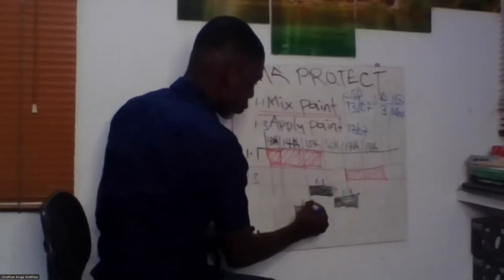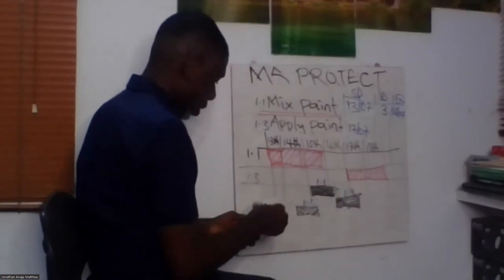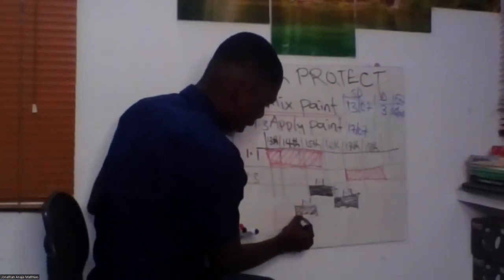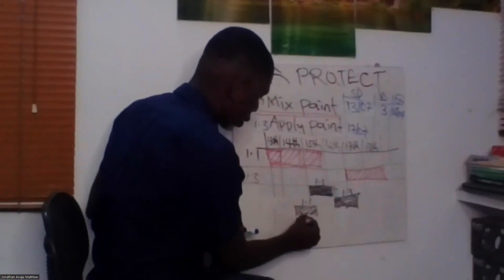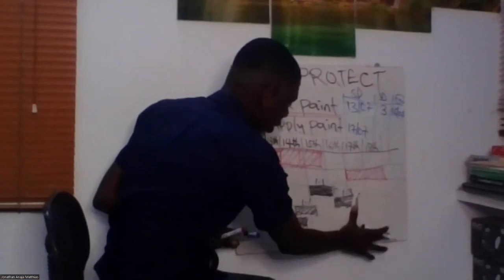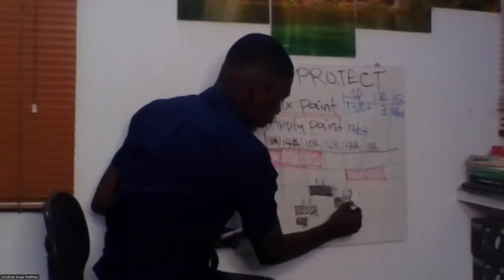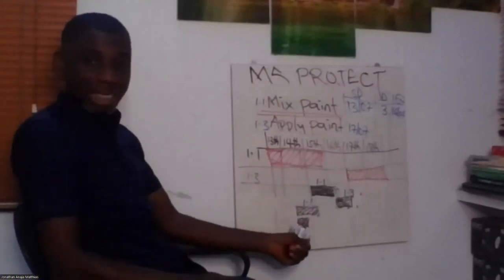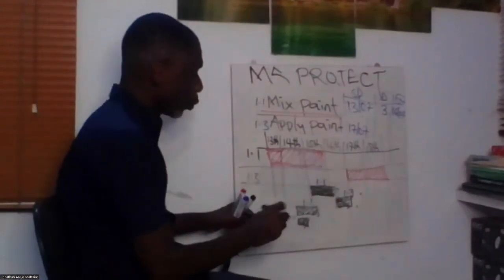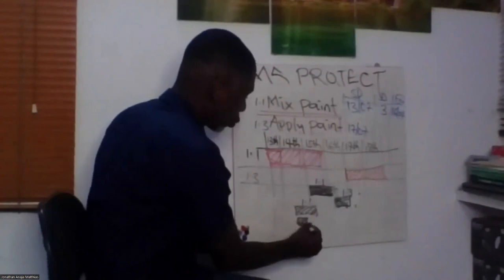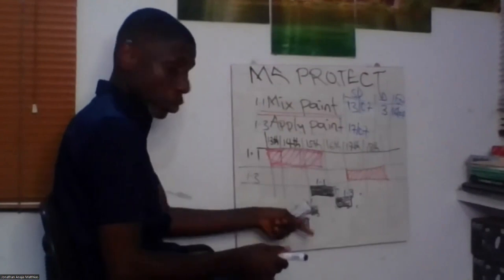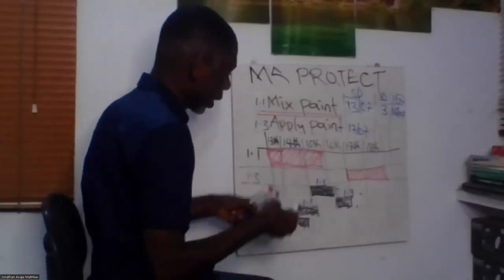Start to start means as soon as 1.1 starts, 3 days, this is a longer bar, then 1.2 can also start. So any activity that has a start to start relationship is likely to look like this. Let me cut this short a bit. It has lesser duration. It's likely to look like this, start to start. If you are taking notes, you can draw it down so that you have an idea. I will clean this off shortly to go back to lead and lag.